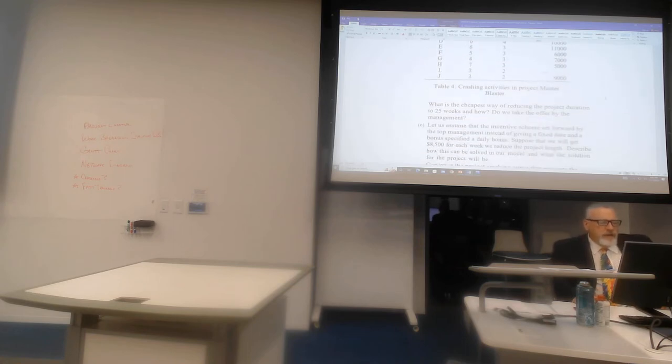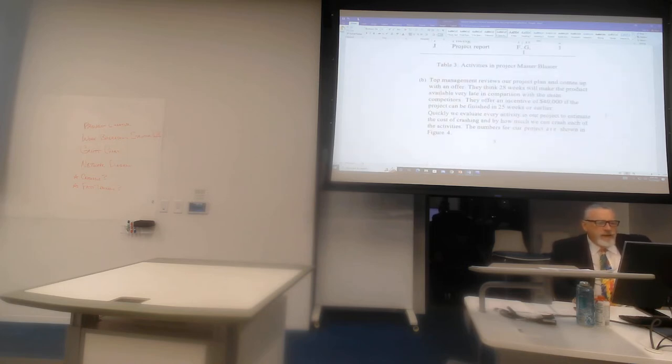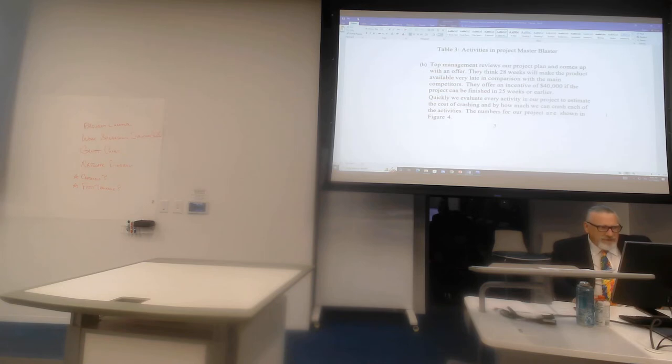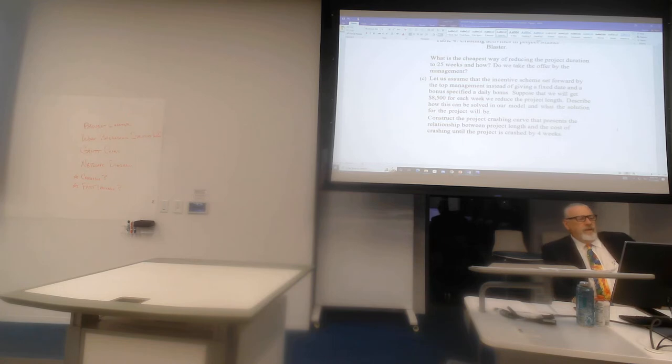So the questions remaining is, what is the cheapest way of reducing the project duration to 25 weeks, and how would we do that? And then, do we take the offer by management, the incentive of $40,000? Does that make good sense to us? And then, let us assume that the incentive scheme set forward by top management, instead of giving a fixed date and bonus, specified a daily bonus. Suppose that we will get $8,500 for each week that we reduce the project length. Describe how this can be solved in our model and what the solution for the project will be.